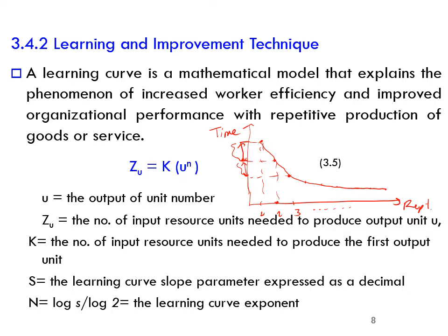Okay, so the learning curve is a mathematical model that explains the phenomenon of increased worker efficiency and improved organizational performance with repetitive production of goods or services. This is the idea. Most learning curves are based on the assumption that a constant percentage reduction occurs in, for example, labor hours, as the number of units produced is doubled.